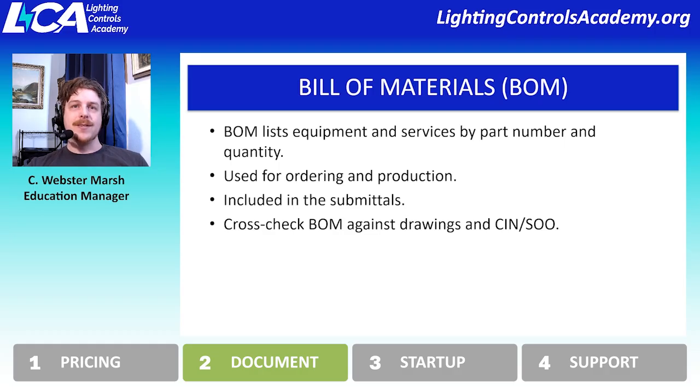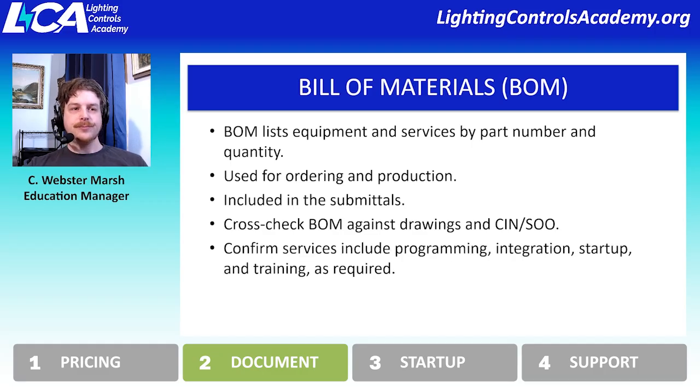the bill of materials. And if you have multiple manufacturers, you might have multiple bills of materials, one from each manufacturer. And so reconciling those can be challenging. And so that's why sometimes groups prefer to stay with just one manufacturer for a project, but it's not always possible to do it that way. And so it's just good to be prepared for there to be multiple bills of materials to be reviewed and cross-checked and coordinated.